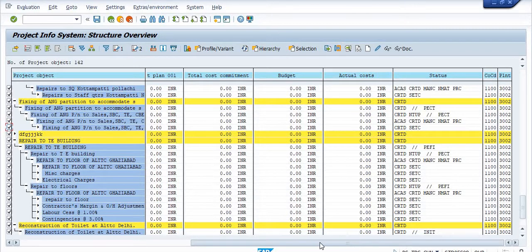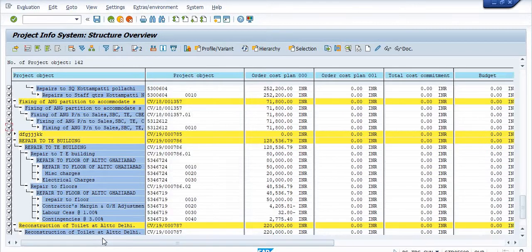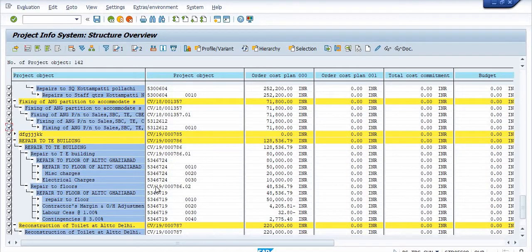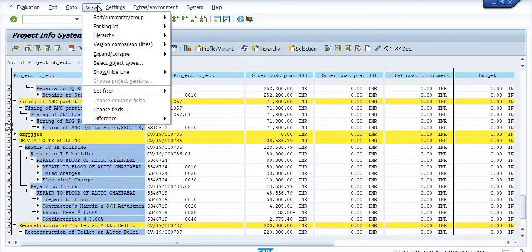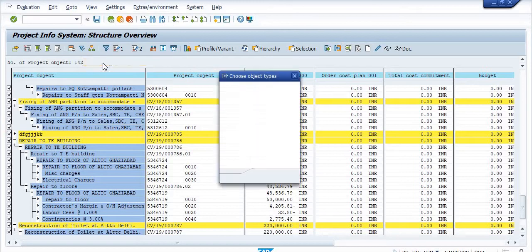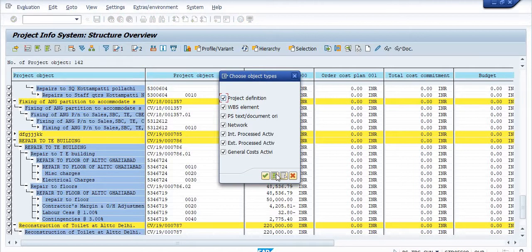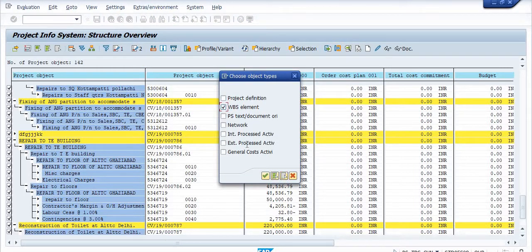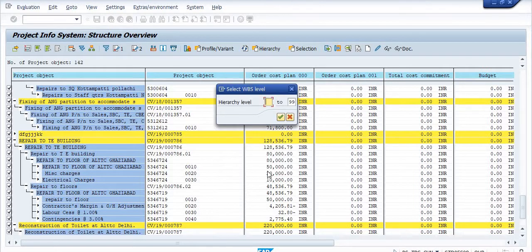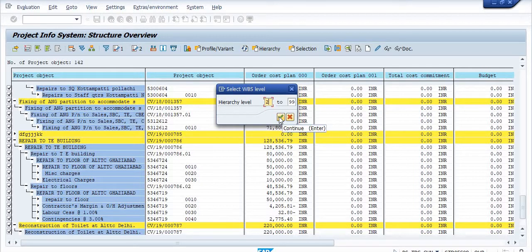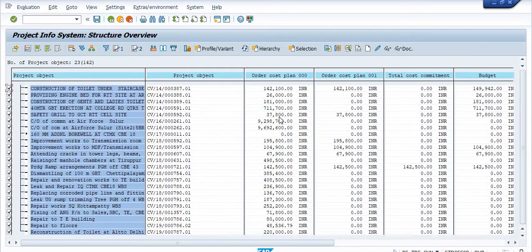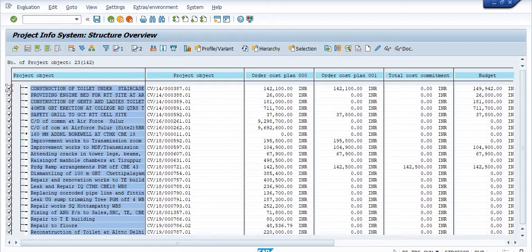If you only focus on the WBS elements, then you can select the object types. You can unselect on and click on the WBS elements. The level two WBS are generally the WBS element and level one WBS are generally project elements. Click on the continue. So these are the WBS generally available in the different different status like take oh CRTD release and all.